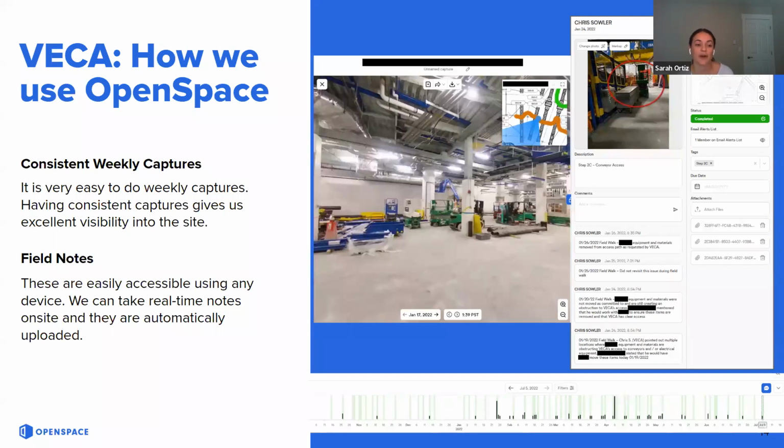Another documentation practice we have done on our project is tracking any and all field issues in a simple Excel spreadsheet. We would go on field walks, and we'd write down notes on our phones of any issues that we ran into. And then when we got back to our office, we would retype them into that Excel spreadsheet. And this document would be shared with our GC and any other subs that were on that walk or involved in any of those issues that we were tracking.